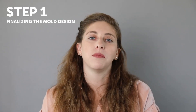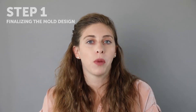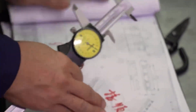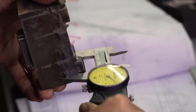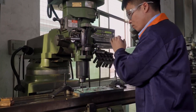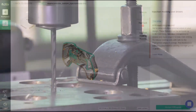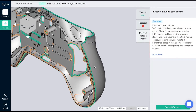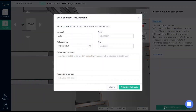The first step is finalizing the mold design. This depends on the part design, so it's best to submit this to your molder sooner rather than later — for instance, maybe when your design is about 80% complete. This allows you to get feedback on the moldability of your design, as well as aspects like draft angle and thickness, so that you can make necessary changes sooner rather than later.